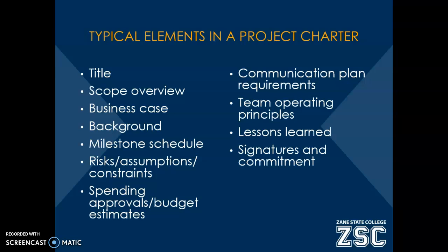It will provide a milestone schedule so that you have a rough idea of how long the project is going to take. It might outline some assumptions that are made about the project and what risks might be involved. If there are any constraints, whether it's resources or budget, that the project is going to be faced with. Again, it's not going to be a detailed budget because the planning phase hasn't really started yet, but a charter might provide some general estimates of what the cost is going to be.